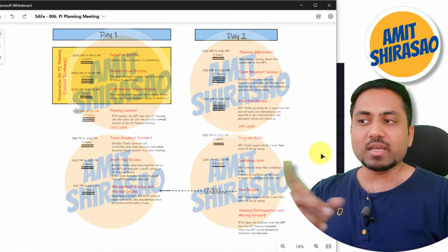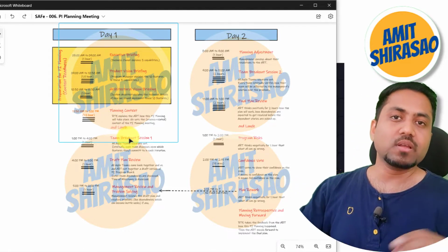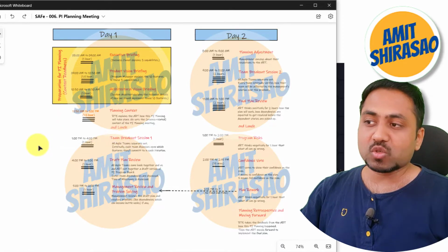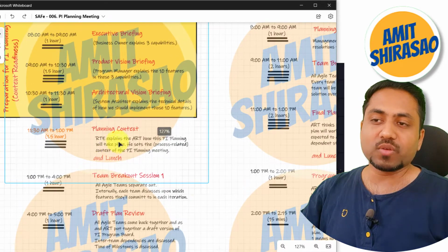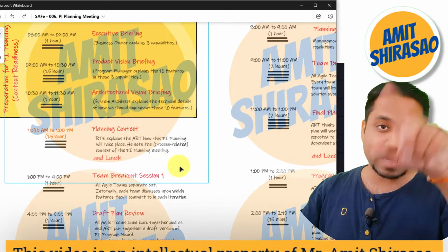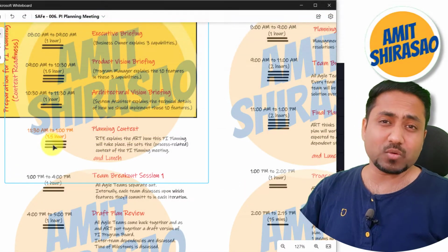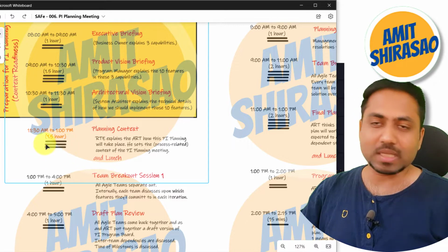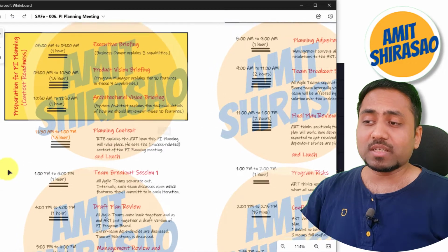The RTE will first explain to these 50 to 125 people how this PI planning meeting is going to be conducted. He or she is just going to explain what we are going to do for the rest of this day and for the next day. That is called the planning context. It takes around 45 minutes, and then 45 minutes are left for lunch. So total 1.5 hours.